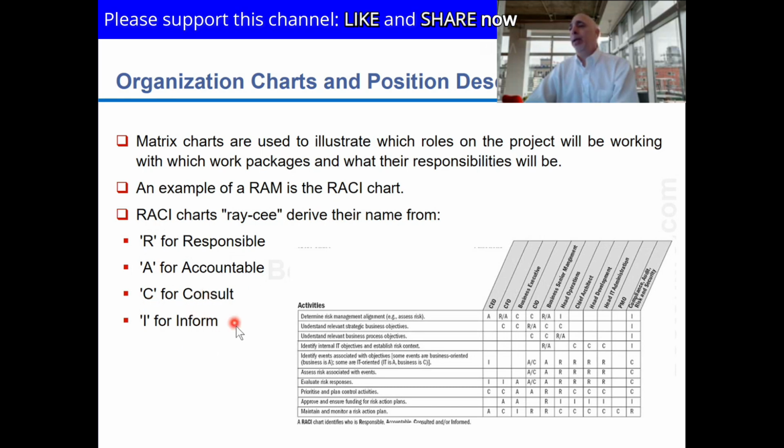In a way, some people will be responsible for doing work, but not everybody will be held accountable. So even if there are 3 people doing one task, maybe putting up the partitions, maybe only one person is accountable, that maybe is the team lead or is the one that's deciding for that team. So I could assign something to one of you or to several of you and name one of you as the accountable.